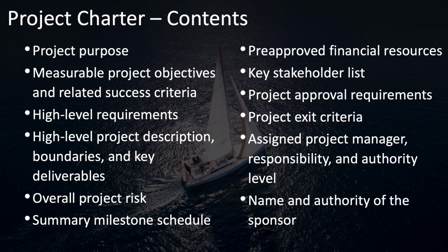Overall project risk will be the starting point for your identification and analysis of risks. The summary milestone schedule will be the starting point for developing the project schedule. As you develop the project budget, you'll also need to start with whatever the pre-approved financial resources are, if any.